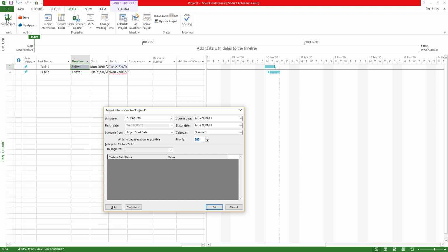Rather than keeping all the project data as separate files which you have to open each of, and which may not really talk to each other, you can keep all the projects within one major project. That way all project files and project data are integrated and talk to each other. So if one person is working on multiple projects, you should be able to see what that person is working on tomorrow, the day after tomorrow, next week, and so on.